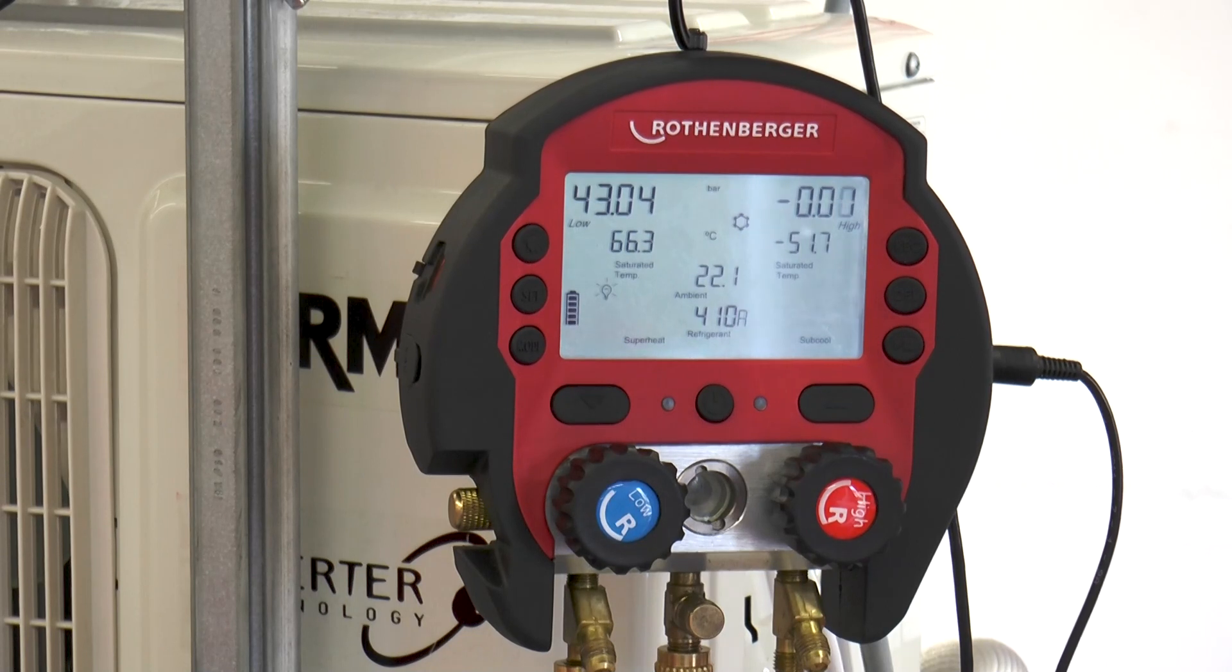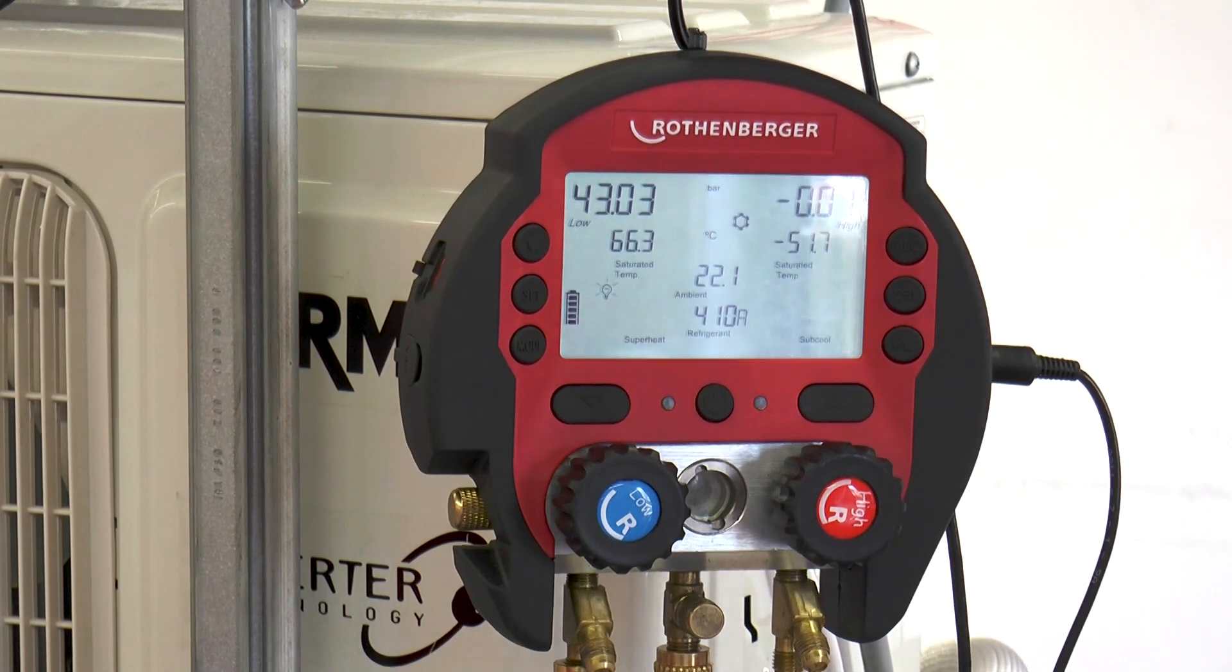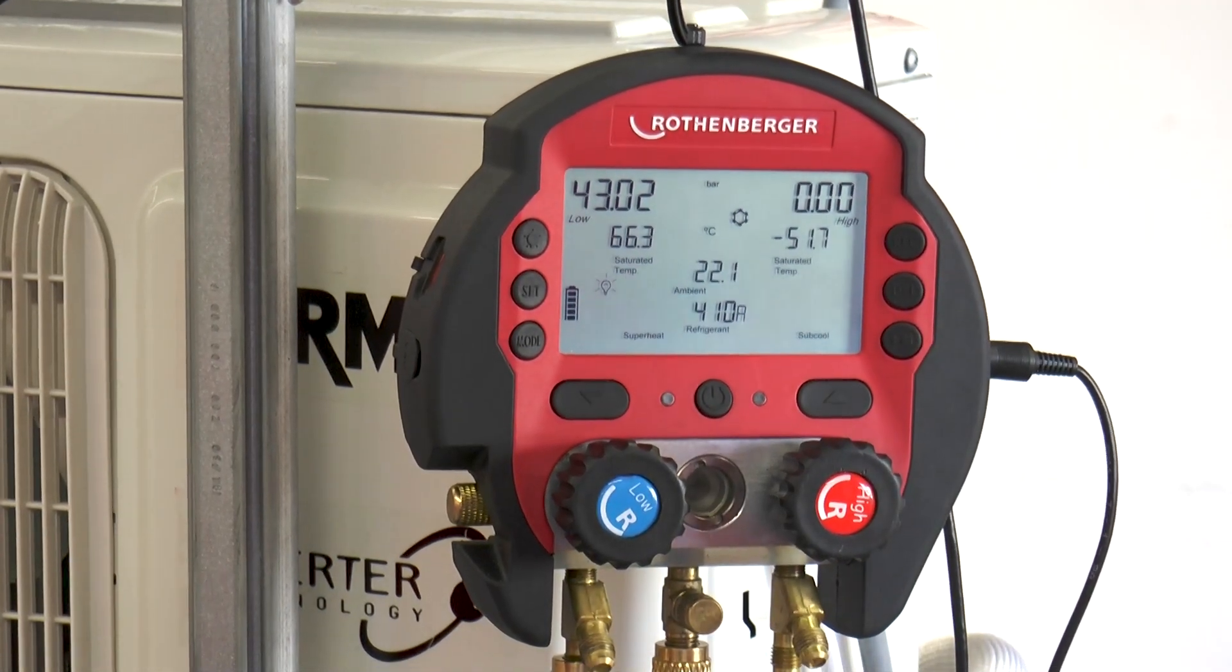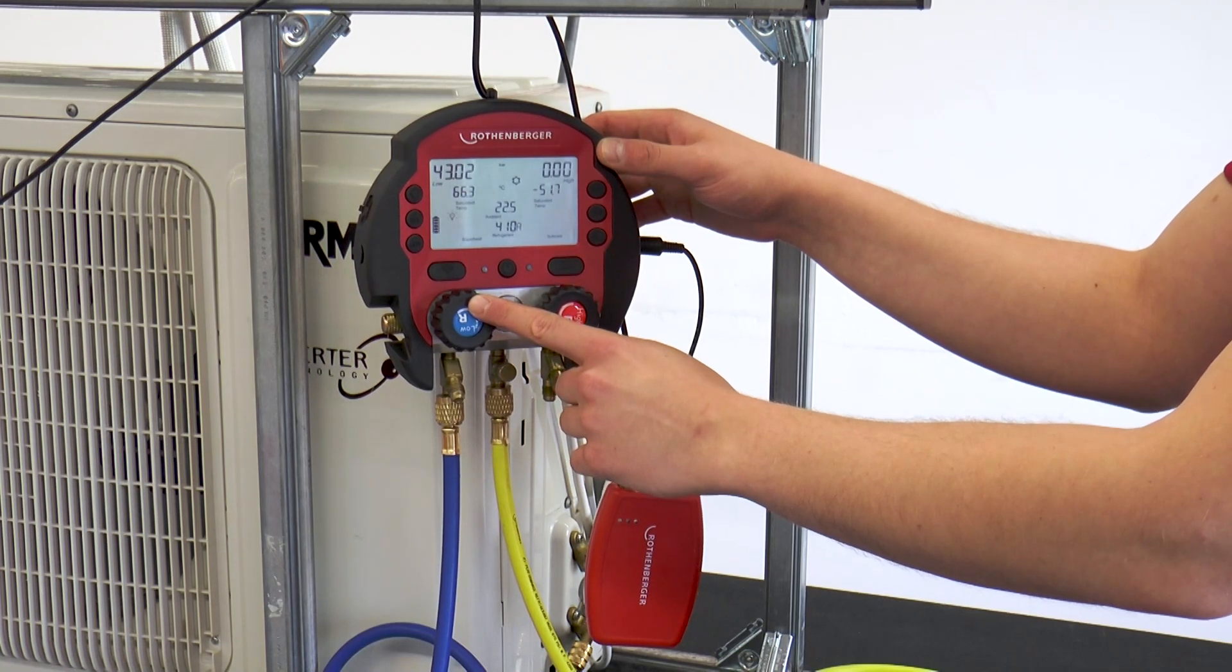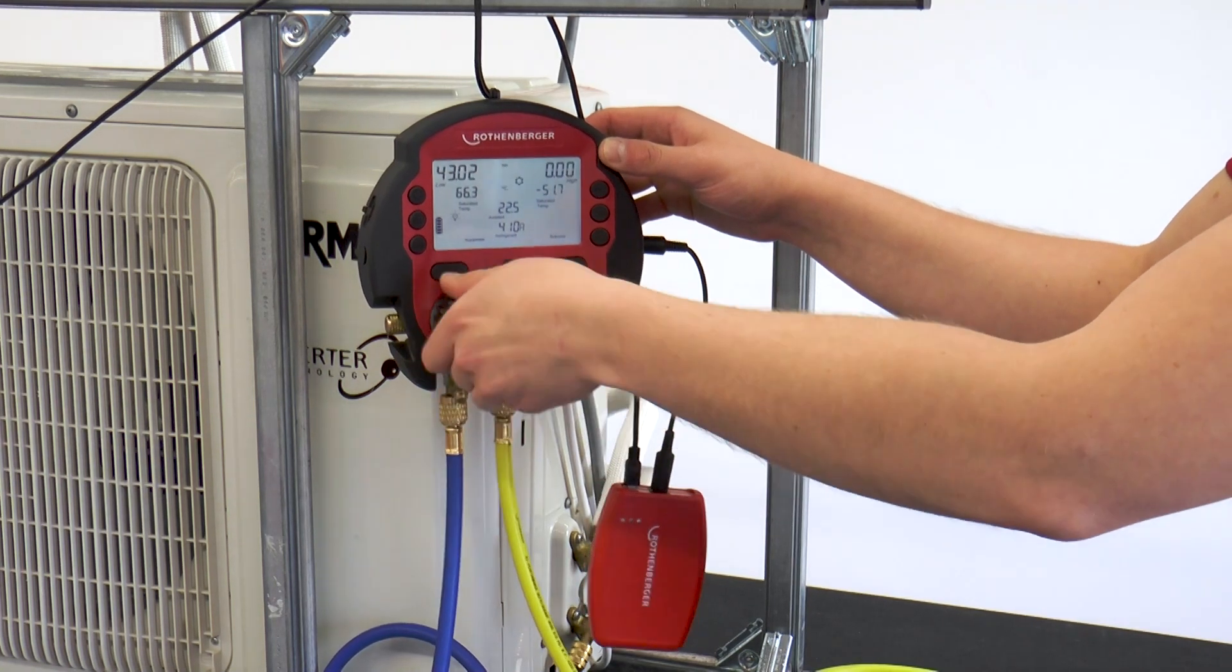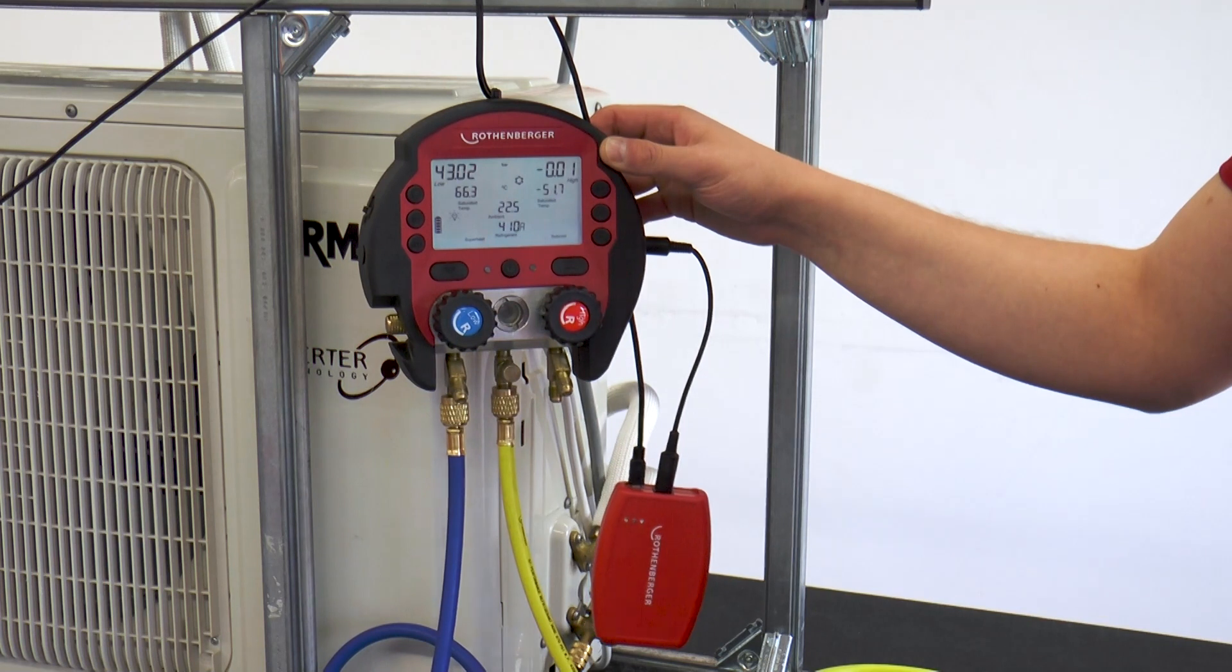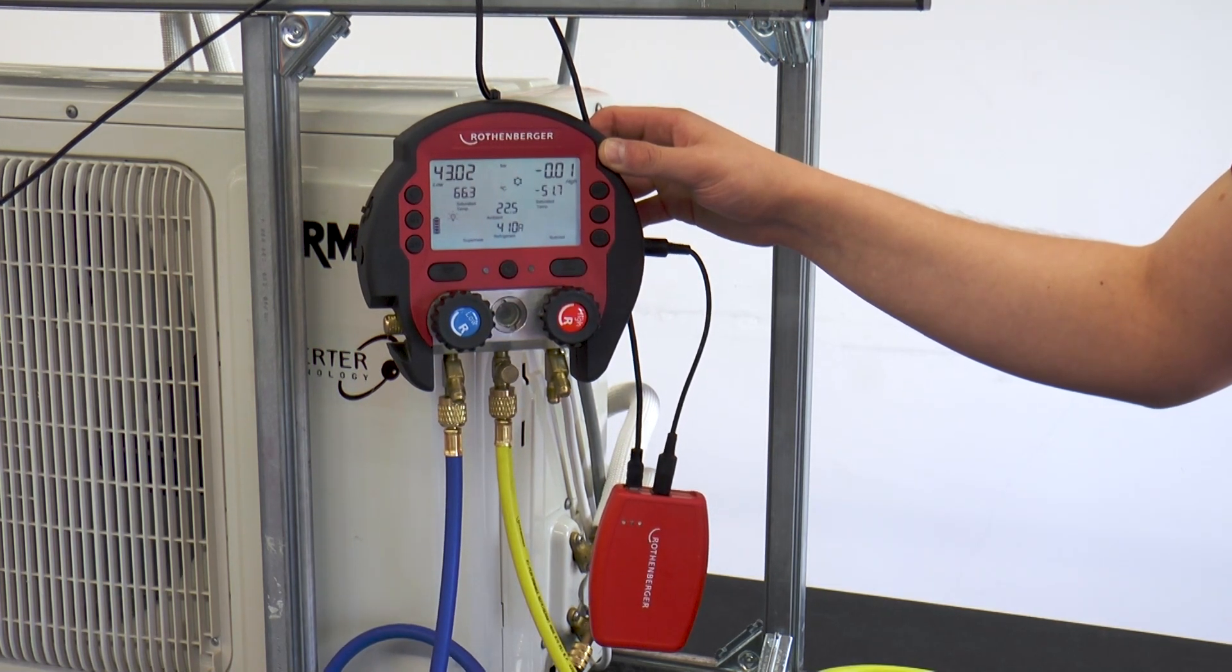The air conditioning system has been pressurized with dry nitrogen at the maximum operating pressure. Our working valve is closed for the measuring process. The system is tight and the nitrogen can be lowered to working pressure level.